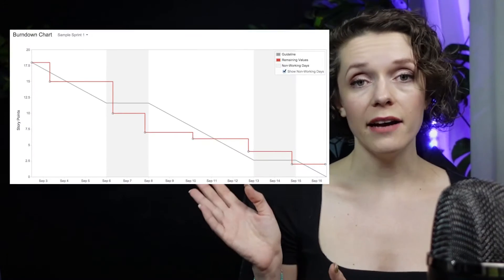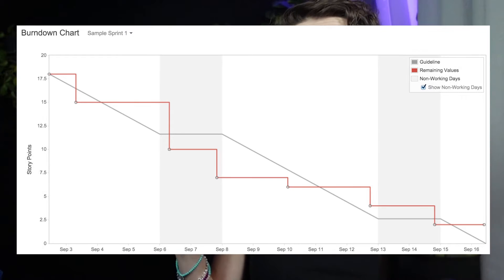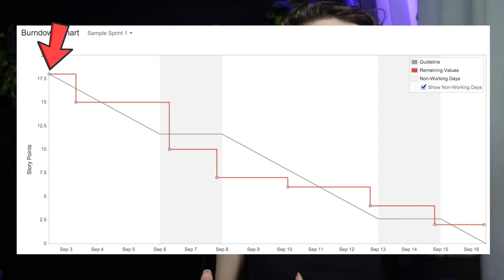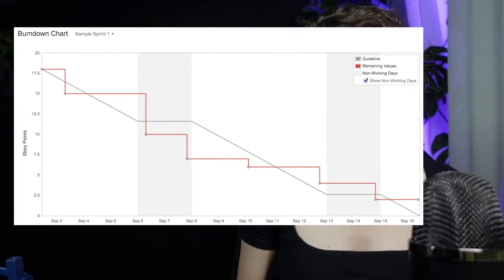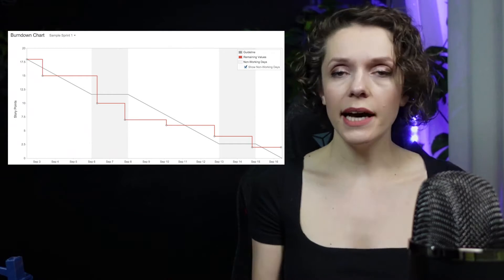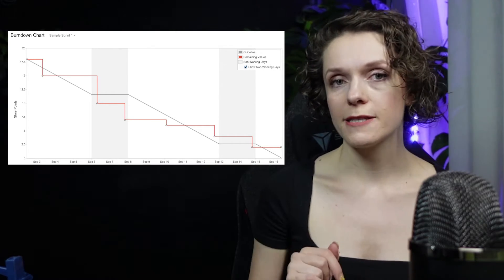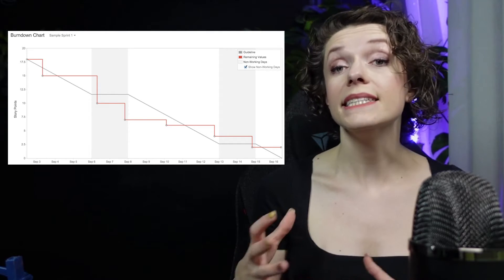Burndown chart. Burndown charts can be quite useful for forecasting. Usually they are used within a sprint by the team to show progress towards the end of the sprint. It can show how likely the team will be able to complete the work based on progress, and it can highlight issues early on to allow the team to adapt their sprint backlog accordingly. Here on this graph you can see progress day by day. The team started on the first day with 17.5 points of work and completed 2.5 points on day one. On the next two days they didn't complete anything. Then on September 6 they completed 5 points. We can see how close they are to the ideal grey line.